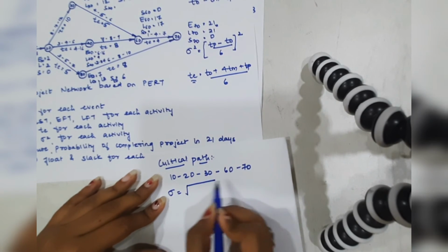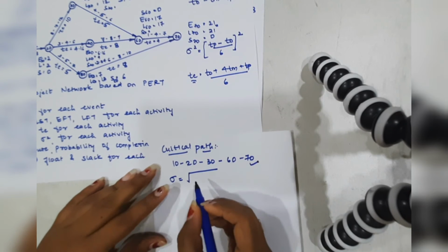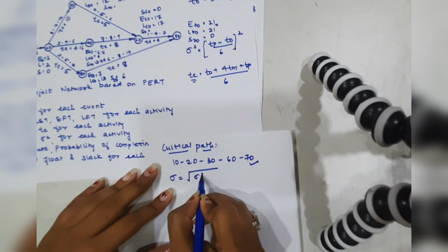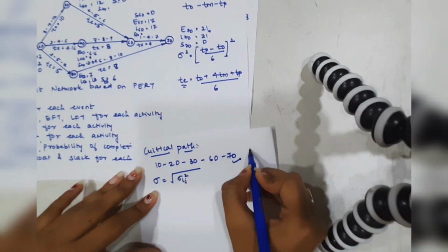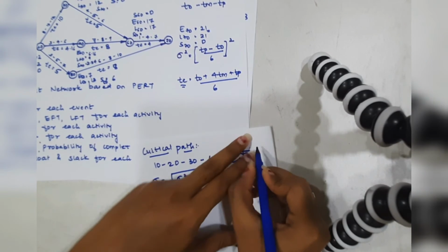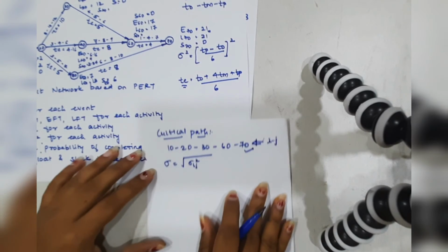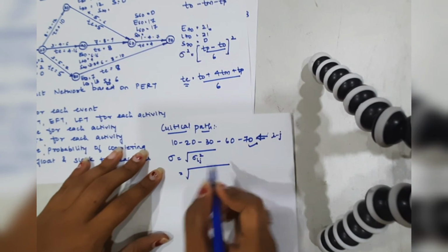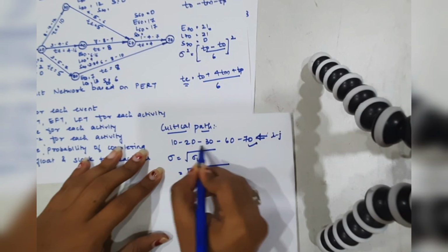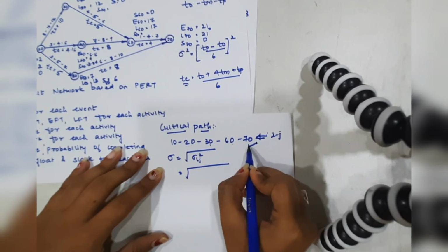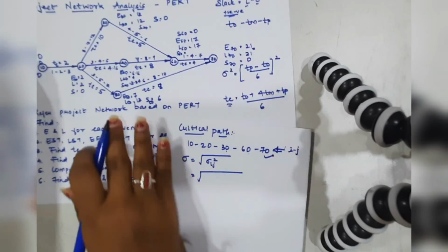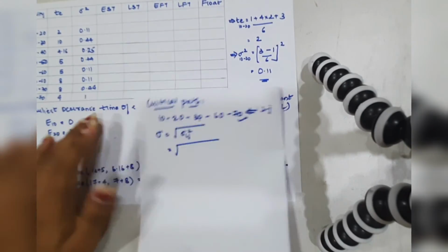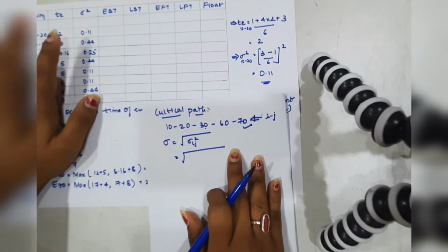For that, first we need to calculate the value of standard deviation from the variance value. In that case the critical path will play an important role. So this is nothing but the sum of sigma square ij. Simply we need to go on, first, second, third and fourth, adding the sigma ij squares. So let's go to the previously built table wherein we have mentioned our sigma values.